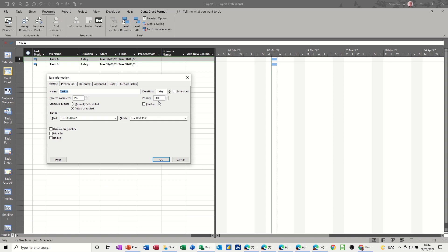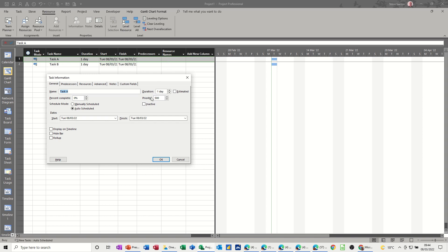Keeping tasks in a set group like that would make it easier for a project to manage resource levelling. So this is all to do with levelling resources, which is on the resource tab and you can see it there and I'll show you how it works in a minute. So just changing this and doing nothing other than that doesn't actually do anything. It can be used as a management tool if you like. You can insert this priority field so you can see it in your table, but it's just going to be a number. You could sort by and filter by it and it would be useful like that, but it wouldn't actually do anything to the order that these tasks go.